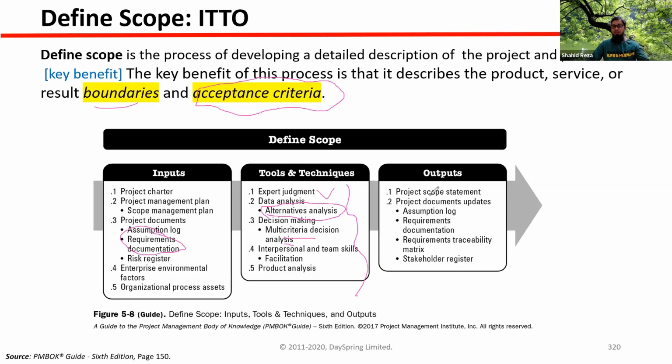All right. So who will actually set the acceptance criteria? Mainly, the team will ask the stakeholders to set the acceptance criteria. Working with the stakeholders for each and every requirement, every scope statement, the team will identify the acceptance criteria. In Agile, there is a term known as definition of done, DOD.